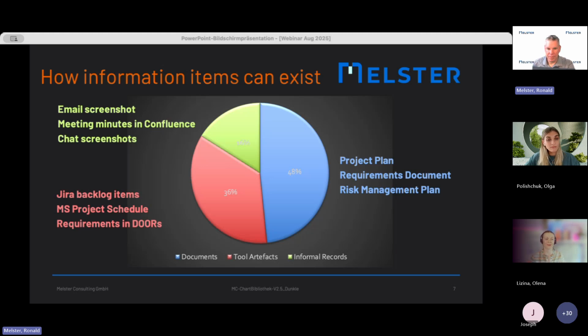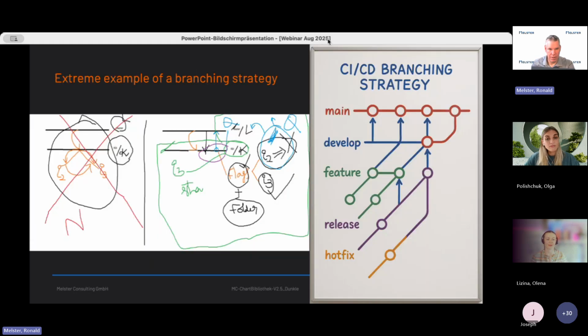And then one day I assessed a company, and one of my co-assessors came from the company, and he insisted that I must accept that the strategy is not a real document by referring to this exact recommendation in the VDA guidelines. The thing was, this project had 450 people working on it. So no, I did not accept this. So this is not the use case for the whiteboard. For a small team, up to 5 or 10 people maybe, working in the same room, yes, it's acceptable. But for literally hundreds of people across the world, it's not acceptable.